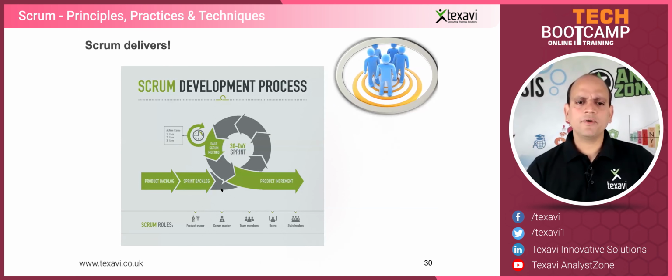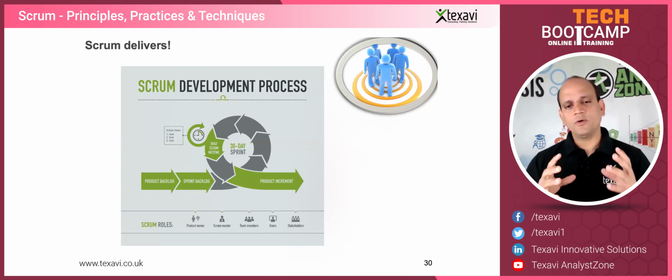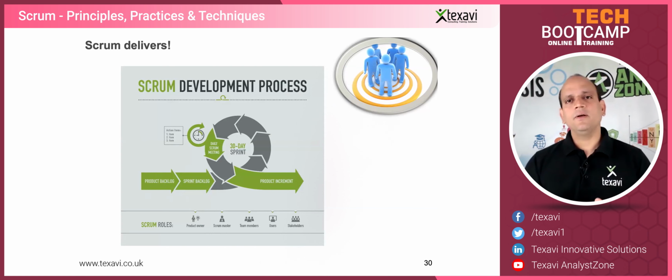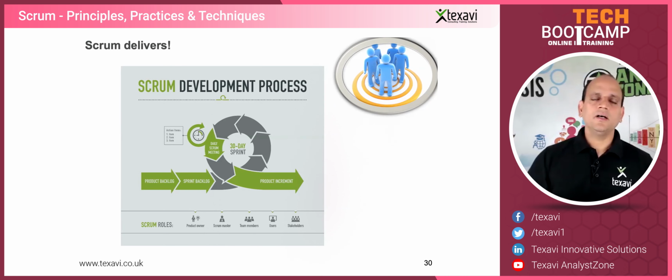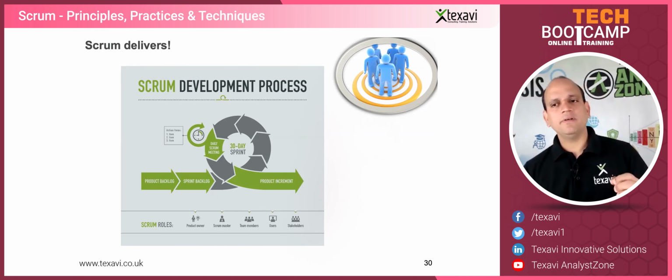So in terms of the development process, we understand that there's a product backlog, right? We've had a look at the product backlog in the last few weeks of our interactions. We talked about how the items are not user stories alone in the backlog. There would be tasks, technical tasks, project-related tasks. There would be changes or improvements of the existing features. There could be performance-related work that you would like to do with the product. And also anything that is a defect or a bug or an issue, all of those would be part of the backlog. That's why Scrum doesn't refer to them as user stories.